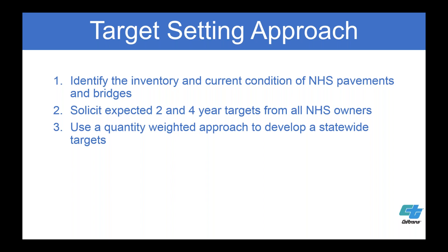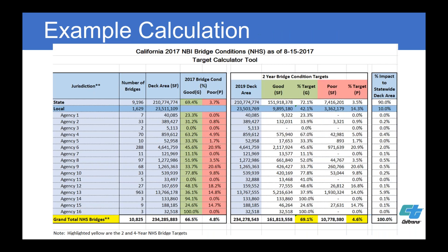We then used a quantity-weighted approach to develop statewide targets. Since Caltrans has 90% of the influence on bridges, our target carries 90% of the total weight for the state, and other agencies carry weight commensurate with their inventory. This required going to every MPO and asking for their input — we had frequent communication, developed Q&As, shared all bridge and pavement data so they could verify what we had. When we got all responses back, we put them into a worksheet to calculate our California two- and four-year numbers.